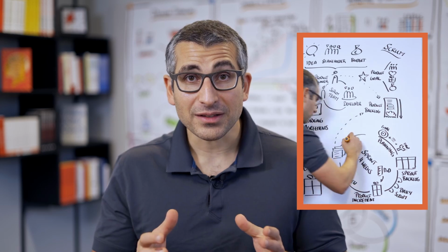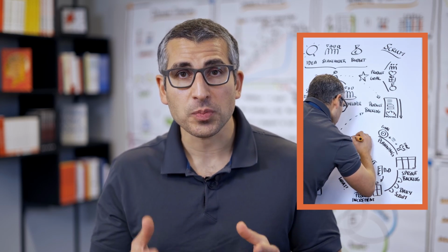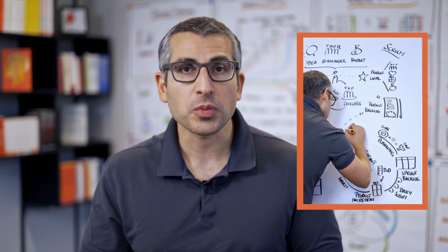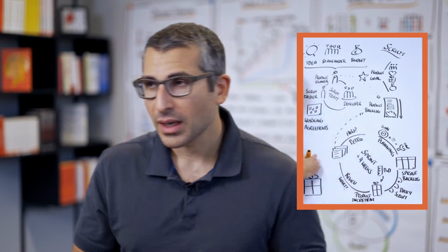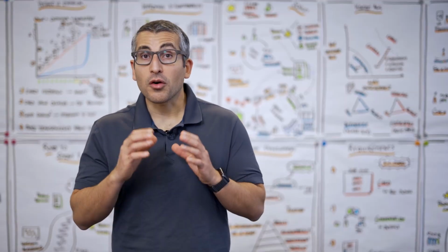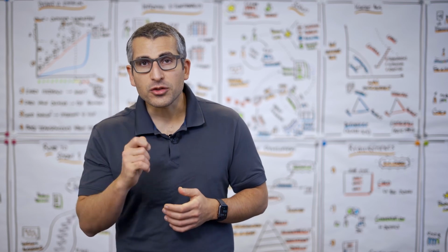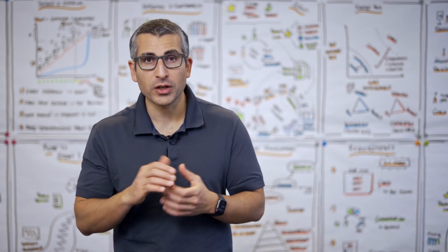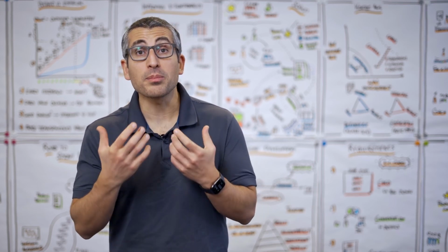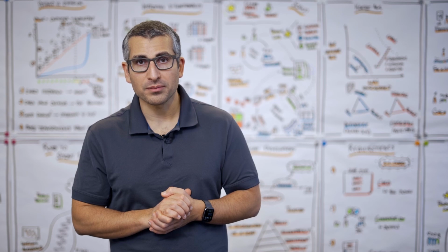The final event, the final meeting during our sprint is the so-called sprint retrospective. Compared to the review, where our focus is completely on what we are going to work on, the retrospective covers how did we work together, how can we improve our collaboration.